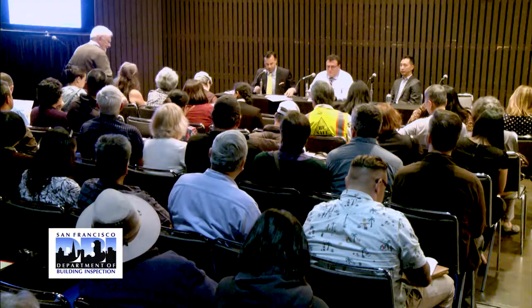Fences, front fences, the front of the building, excluding a corner building. The front fence, you don't need a permit for a maximum of 3 foot high fence. And fences at the rear of the building, in your backyard, 6 feet high maximum.